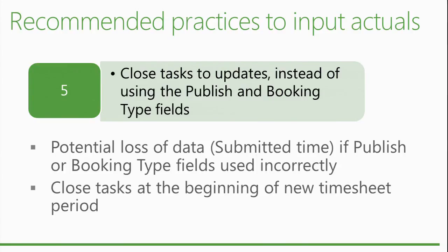Because when you publish, it's actually going to calculate everything in the time phase value, and this is where it's going to update all the tables. And it's going to take more time if you have very long duration and a lot of resources, because each task becomes a lot of workload, basically, to be able to cut all this time period by the unit that is stored in the database, and for each of the resources that is part of the task or the project.